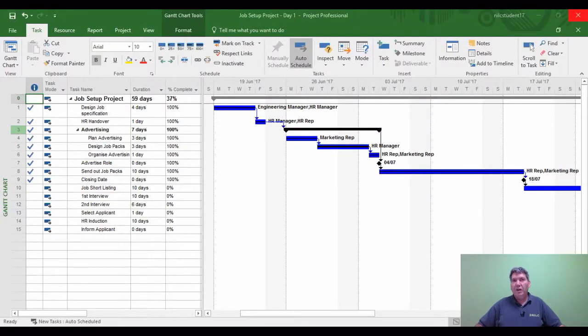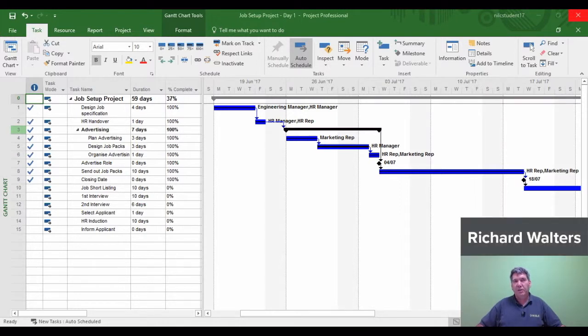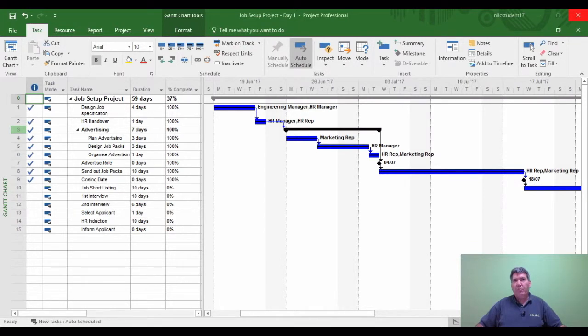In this video, we're going to look at creating reports within Microsoft Project. To create reports and make reports effective, Project relies on two areas which are really important to allow it to create its reports. Percentage completion, which I've added a column in here to put some percentage completions in. And the other one is a status date.